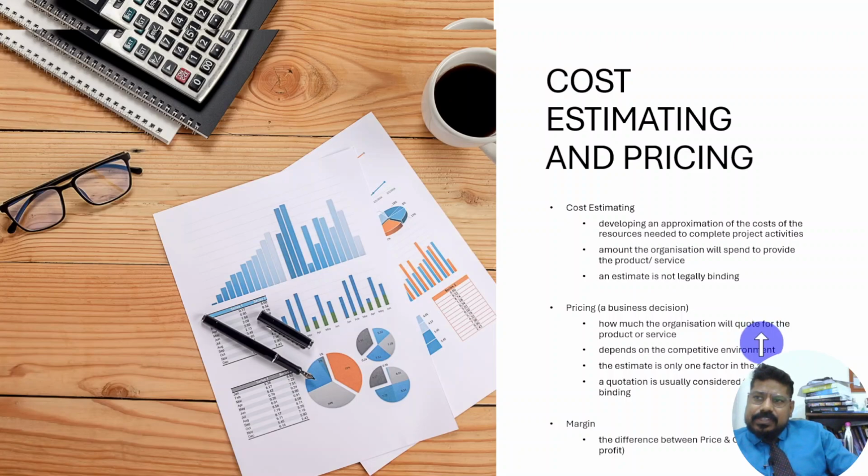Pricing is a business decision: how much the organization will quote for the product or service depends on the competitive environment. The estimate is only one factor in the decision. A quotation is usually considered to be legally binding, and margin is the difference between price and cost.